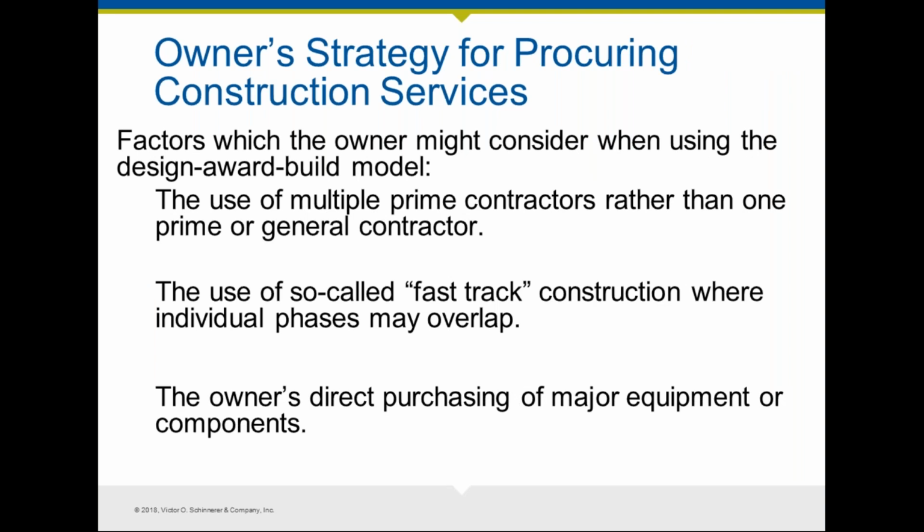The other issue that needs to be addressed in your planning services, as you're planning the project and helping the owner define the project, is what is their strategy for procuring construction services? For the purposes of this discussion, we're assuming that the project is in a design-award-build model, meaning that you provide the design and consulting services, and provide the owner with a set of construction documents which they use to award a separate construction contract to the contractor.